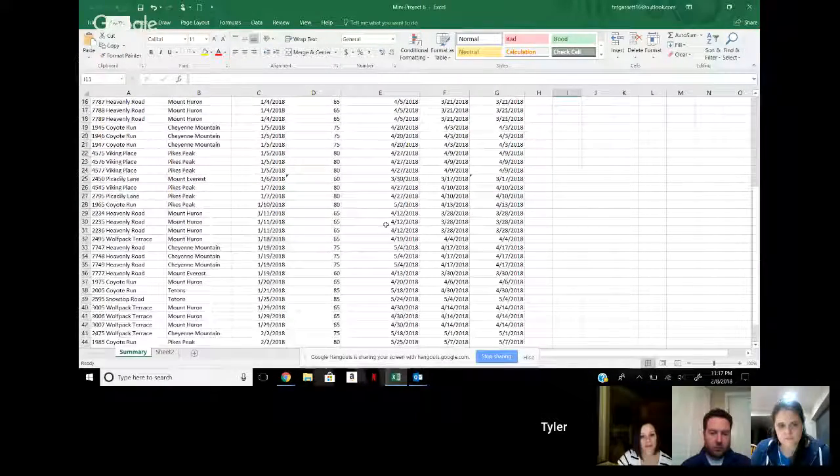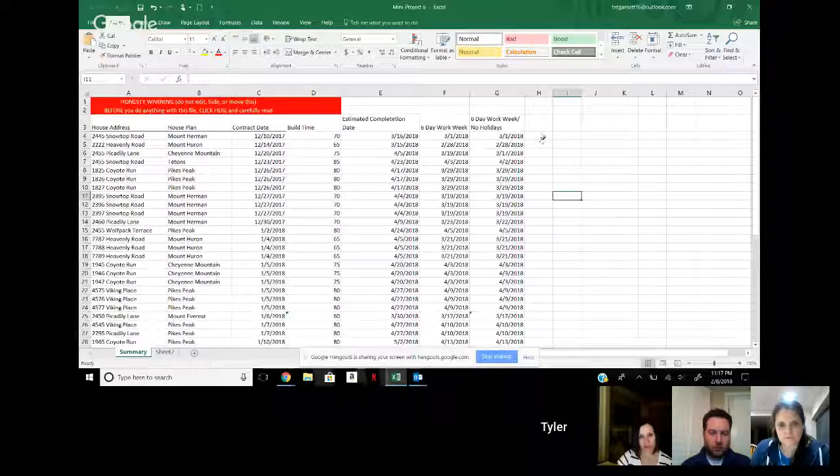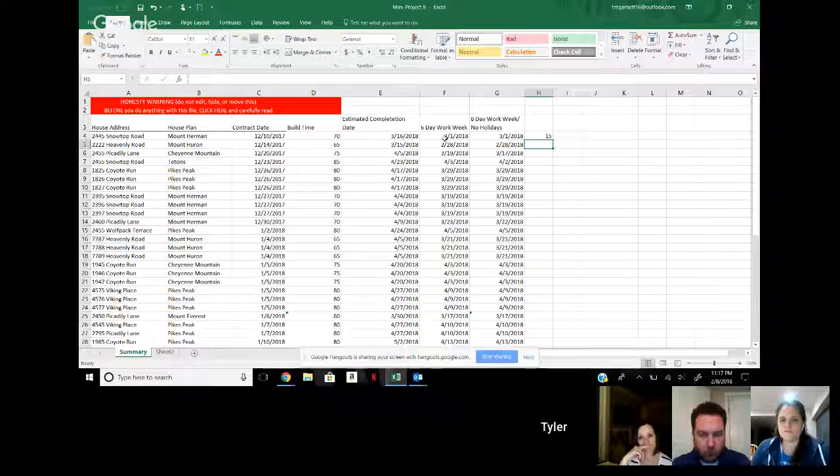Okay. Cool. My next question is, how do you count the difference between the days? I can do it in my head, that's obviously like 15 days. Remember how each date has a numerical number associated with it? If you just do equals E4 minus F4. That's exactly what I did.